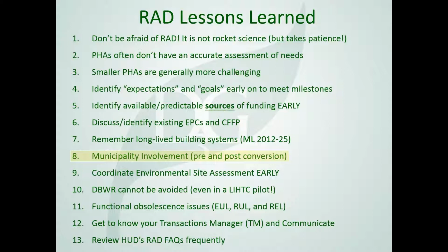In this case, we went and asked the DPW about that arrangement post-RAD conversion, and it was confirmed with us in writing that upon conversion they will have no responsibility to maintain any of those features, and they would be the responsibility of the property. That changes some of the structure in our review, because items that were before not in contract now become in contract because of the municipal involvement change during the conversion process. So vet out those things if you think they apply to your project.